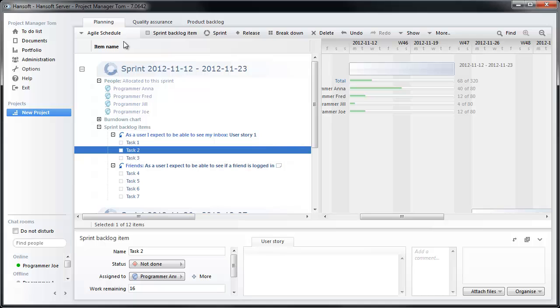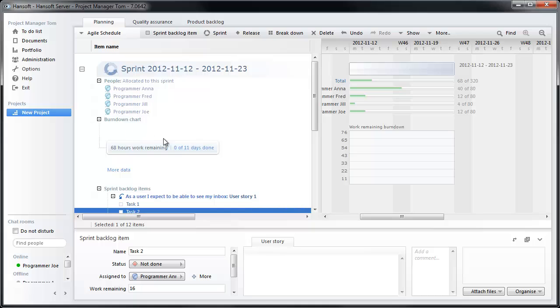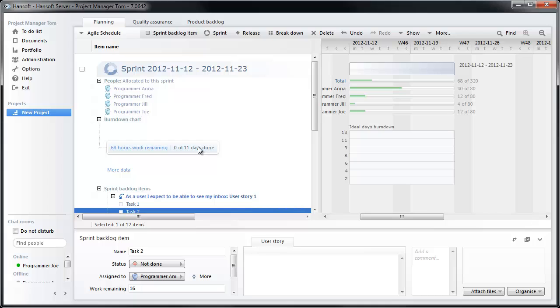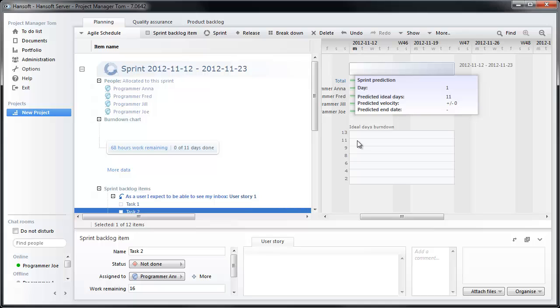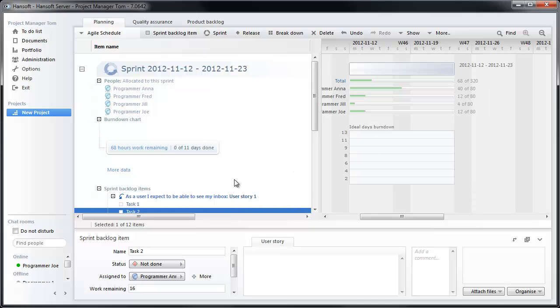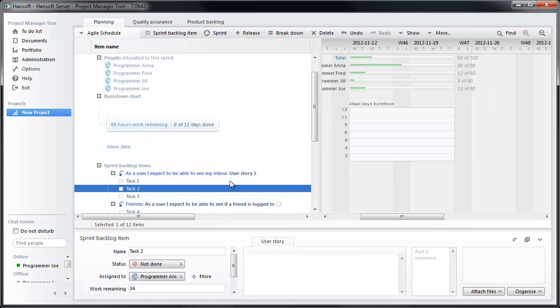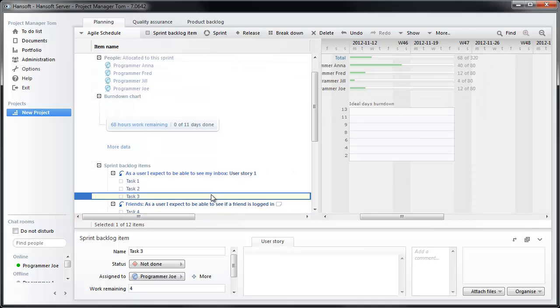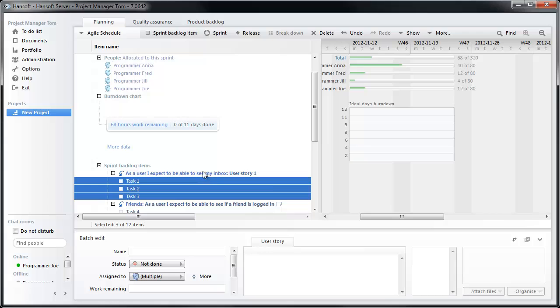As you work in the sprint, you will start gathering a burndown chart. You can see here, by default right now, we're looking at work remaining. We have exactly 68 hours work remaining left. We can also look at the burndown for the estimated ideal days. Those are the days that are coming in from the backlog. You will only get a burndown when the whole item has been completed, when all the tasks below one of these user stories are set to completed.